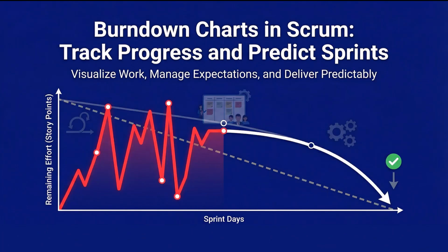Before, a legal compliance reporting team had the irregular/jagged pattern. Their burndown looked like a seismograph during an earthquake. Diagnostic. Heavy dependency on legal department reviews, which were unpredictable. Also, tasks were too large.